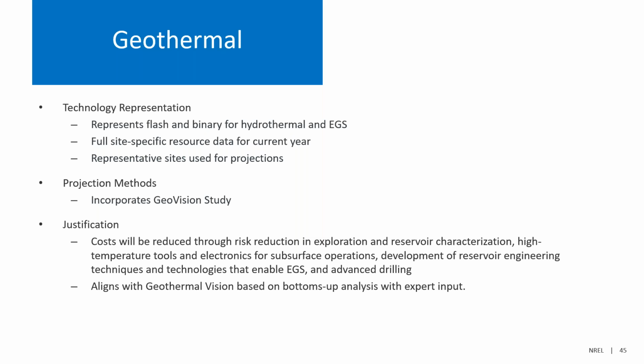In terms of the projection methods, we incorporated a bottom-up analysis that's outlined in the geothermal vision study, that includes estimates and justifications for all of the various costs and technology components, such as exploration costs, drilling costs, power plant costs, and O&M. And these costs were developed in conjunction with the other national laboratories through discussions with experts, and were validated by an industry team that we called our visionary team.